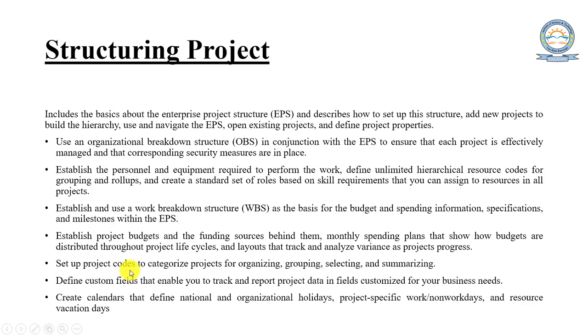Set up project codes to categorize projects for organizing, grouping, selecting, and summarizing. Define custom fields that enable you to track and report project data in fields customized for your business needs. Create calendars that define national and organizational holidays, project-specific work and non-work days, and resource vacation days.